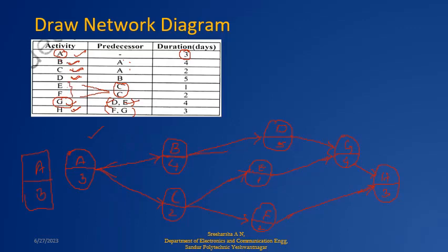Now the next activity is E. If you observe, in the previous activities we are seeing the C activity two times, that is, after C there are 2 activities starting. So I am taking a V shape, not a straight line. I am taking a slant line and drawing E here, and E consumes 1 day's duration. Then one more activity F, which consumes 2 days.